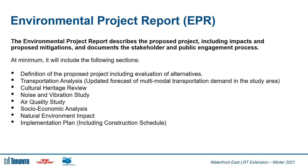At minimum, it will include the following sections: a definition of the proposed projects including evaluation of alternatives and transportation analysis, which includes updated forecasts of multimodal transportation demand in the study area; a review of cultural heritage impacts; assessment of noise and vibration impacts and mitigations; assessment of air quality impacts and mitigations; an analysis of impacts to the socioeconomic environment; an analysis of impacts to the natural environment; and the development of an implementation plan including construction schedule.